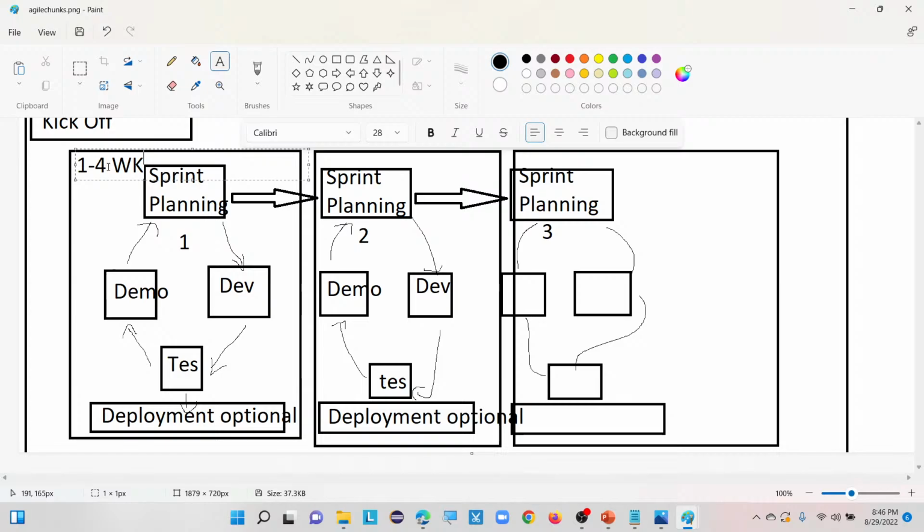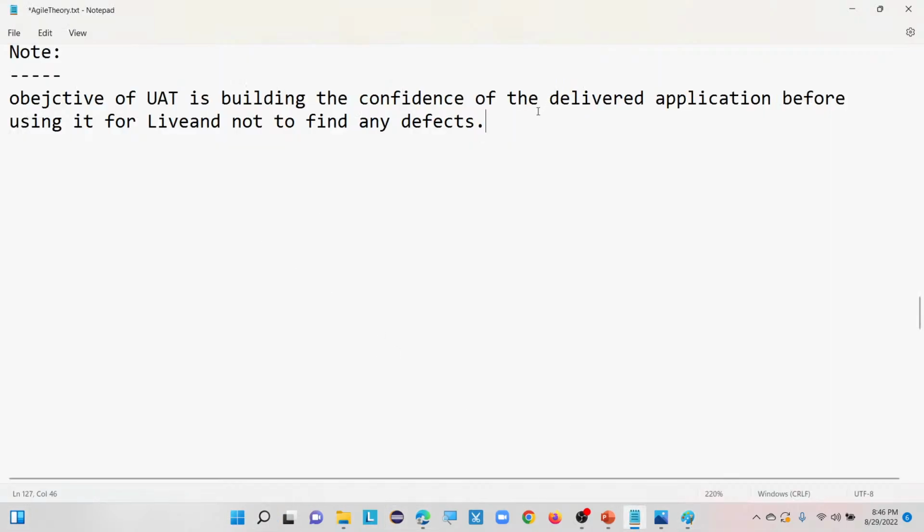Rather than spending 1.5 months on requirements gathering, in the agile model the team will first decide what the basic core features are that are required in that particular product, then decide which are going to be developed, and then release that particular chunk to the customer. So we will note down all these points now. This is up to the waterfall model.